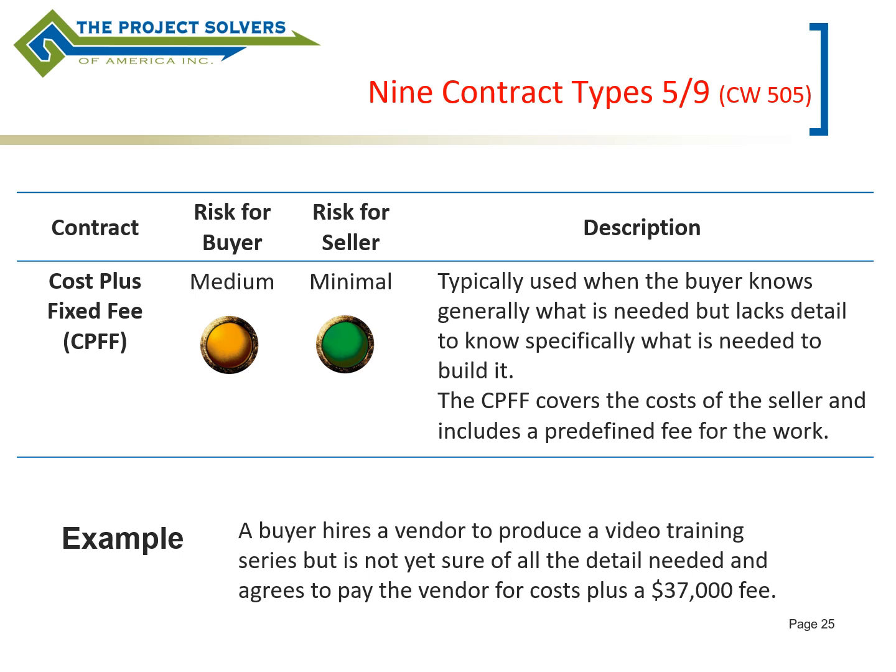With a cost plus fixed fee, the seller has all of their costs reimbursed, plus the fee part, which is their profit. The fact that it's a fixed fee is helpful to the buyer because they know exactly how much money to budget up front, which is why the risk for them really is more on the medium side as opposed to the high side.